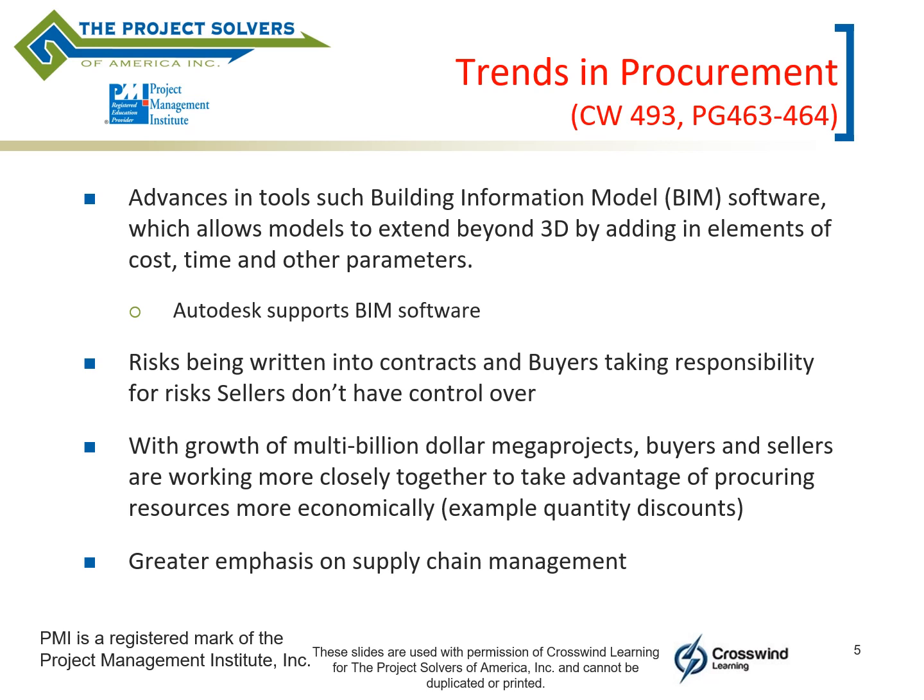The other advance, which is actually a very good thing, is that risk is now being written into contracts, especially those fixed price type contracts, with buyers agreeing to take over some of the responsibility, especially for those areas that the sellers will not have control over.